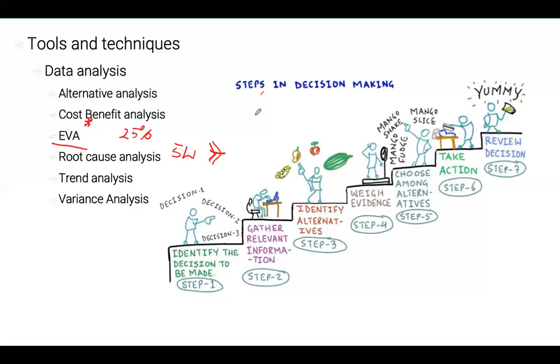Trend analysis, those of you who work in process and look at performance charts and look at the measurement charts, daily measurements, obviously, if you have some control limits, and then, sorry, this doesn't really look very well, so let me redraw. If you have some spec limits and then some control limits, and then you observe your work performance measurements and notice that the measurements tend to move in one direction only. That's a trend. So we observe trends to see whether we're getting better, I guess, or getting worse, where we're becoming outside of what's acceptable or within acceptable.